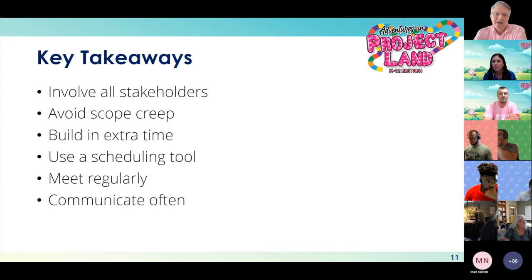Building in that extra time, as Natalie pointed out, is not something that you necessarily need to do or should do at the task level, but you certainly want to build in that buffer either within your particular phases of the project or just within your project overall.